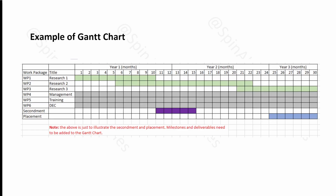Here is an example Gantt chart provided by the European Commission. You can see how it is divided: the first column lists work packages WP1 through WP6. You can also include secondment, placement, dissemination, communication, and outreach — these are not shown here but should be added. The columns represent months — this version covers 36 months for a Global Fellowship; for a European Fellowship you would cut it at 24 months. Activities are color-coded to show their duration — for example, green means Work Package 1 continues up to month 10, while Work Package 2 starts at month 6 and continues to month 22.